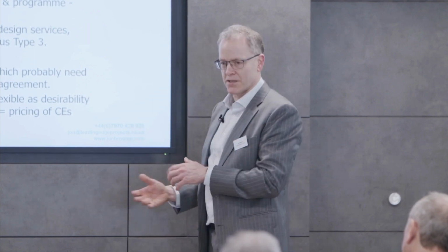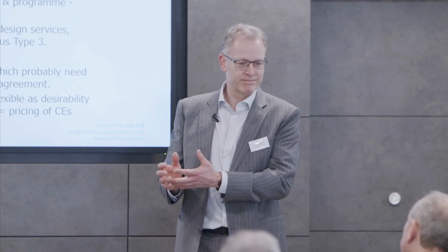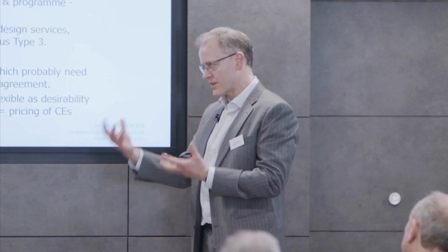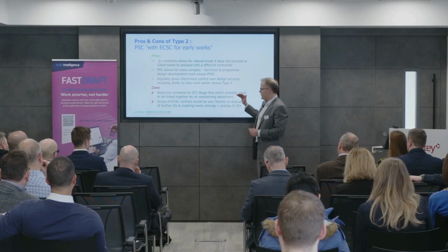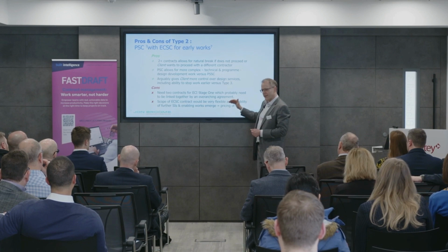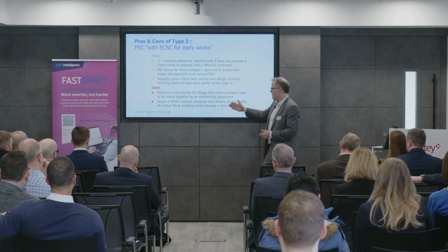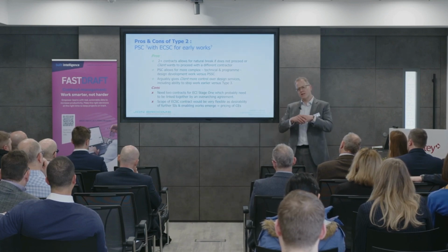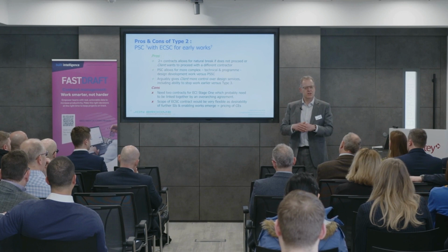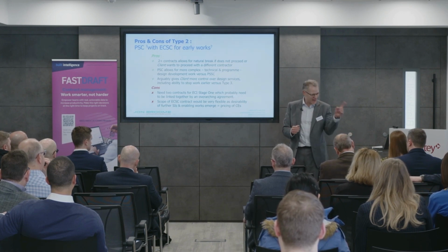I don't think it's insurmountable, but it's a bit more complicated than signing one contract, putting in place multiple contracts with the same person. And what it means is that if you're not sure what works are going to be done, physical works, site investigation, enabling works, that engineering construction short contract needs to be set up with quite a broad description of the works, because you might be adding to it as they say, oh, a site investigation over there would be good.